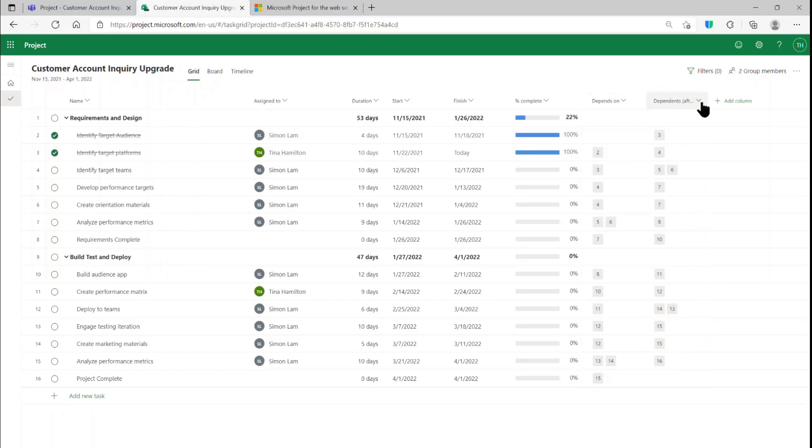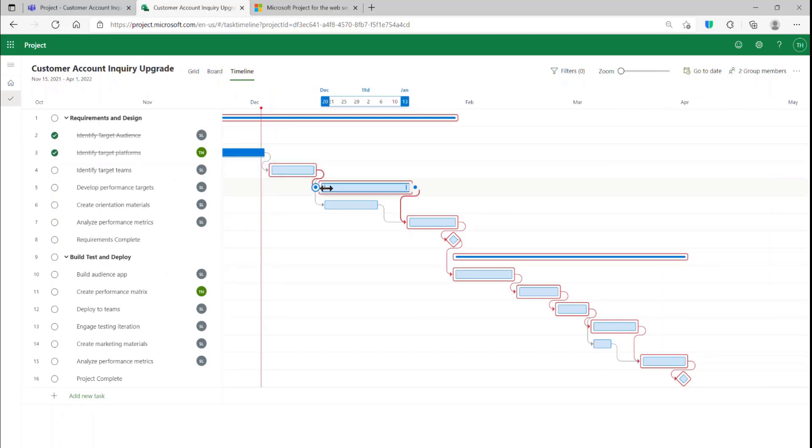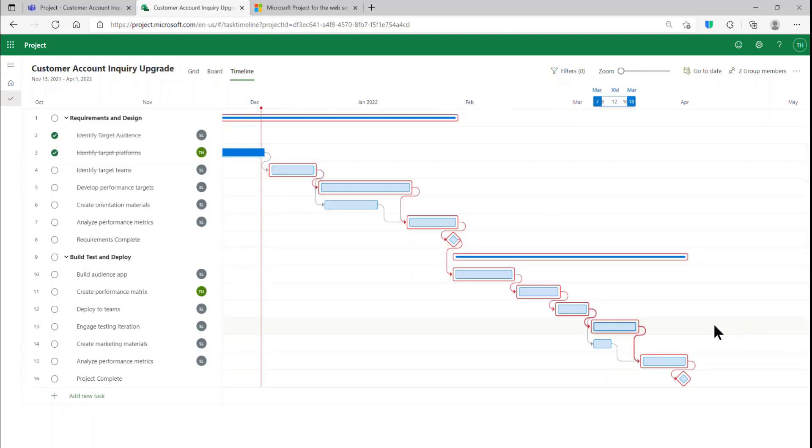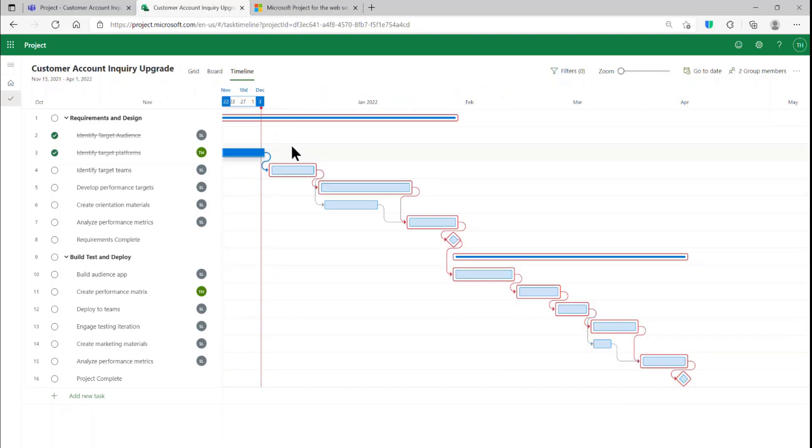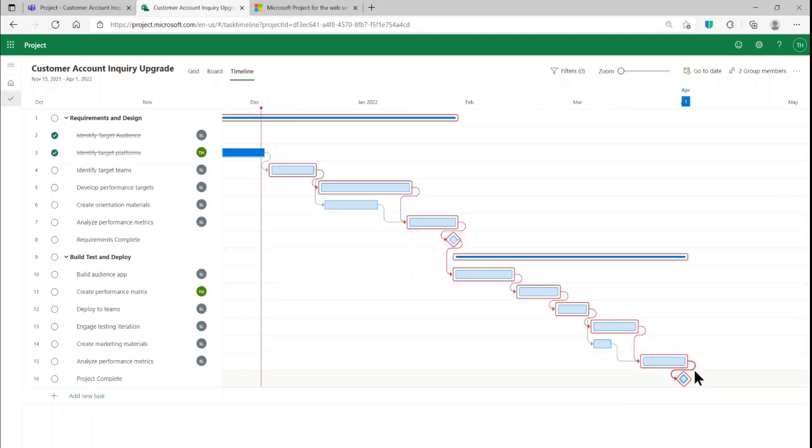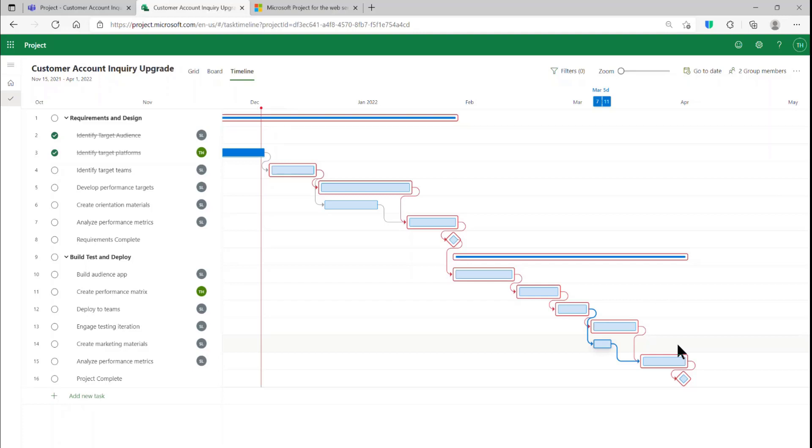There's a couple of other guidelines. Keep the general direction of your links down through the plan so that the beginning of your schedule is up at the top, but the end is at the bottom, and the general direction of the links is down. This is for your own purposes to help make it simple, and that's best practice number two. Keep it simple.